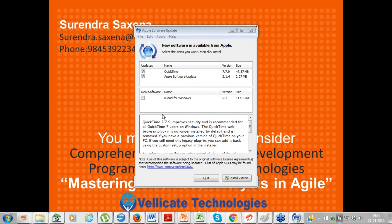Is feedback from a previous sprint always included in the next sprint? Feedback is a very important and strong point of agile. Feedback needs to be taken and business analysts play an important role in evaluating and recommending what should be included in the next sprint to add value to stakeholders. Regarding development changes — they are new requirements that come and sit in the product backlog. They get prioritized in relation to other requirements as part of sprint planning.